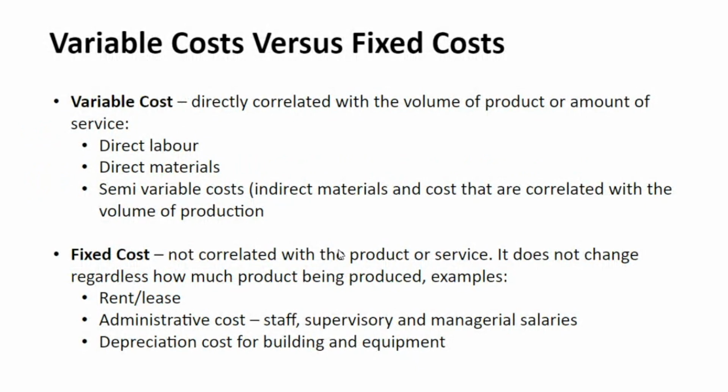So for variable costs, some of the things you want to consider are direct labor. If you have a machinist on a machine, that's direct labor. That person needs to be standing at that machine. That person is getting paid X dollars an hour. So right off the bat, it's going to cost you X number of dollars to do that product. If it takes 3 hours, it's 3 times whatever the rate is. Then there are the direct materials, the pieces of stainless steel that you're going to use.